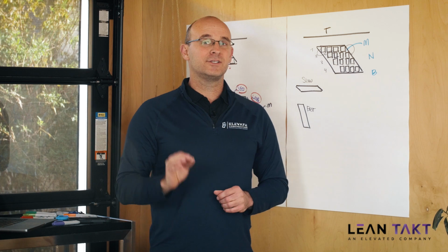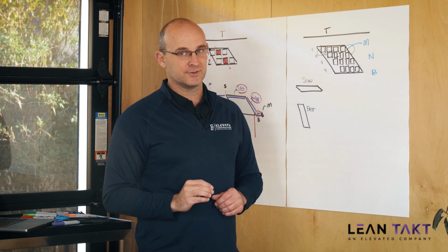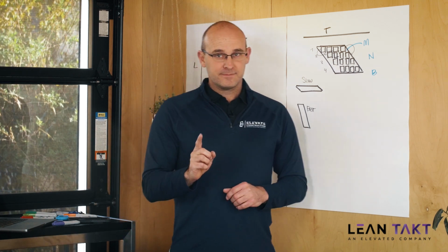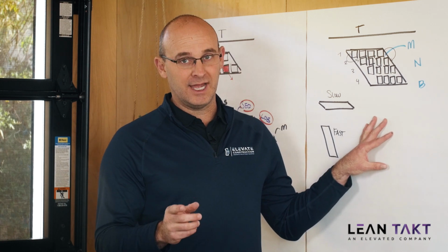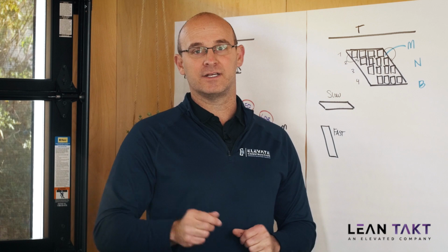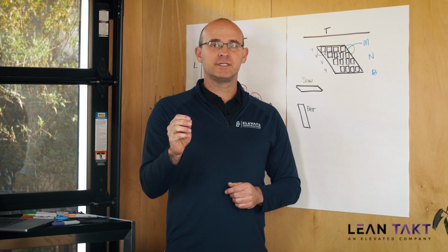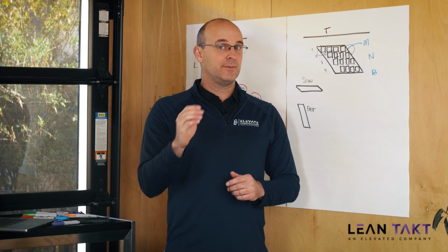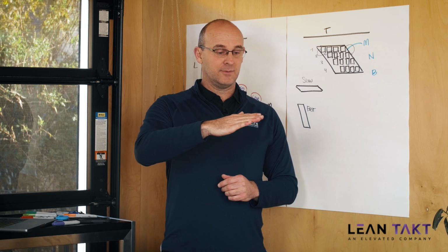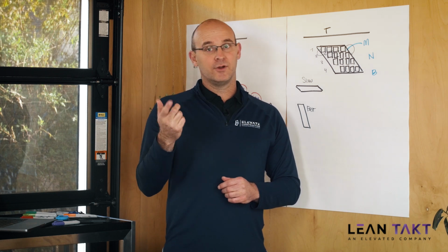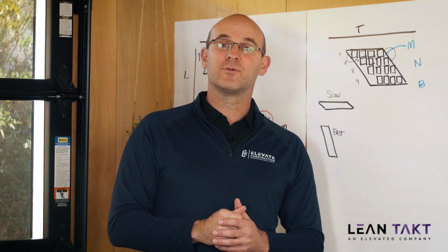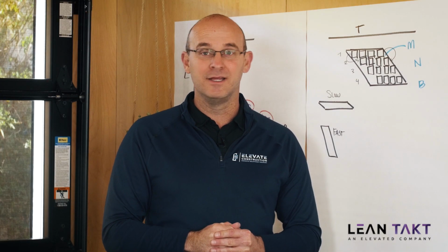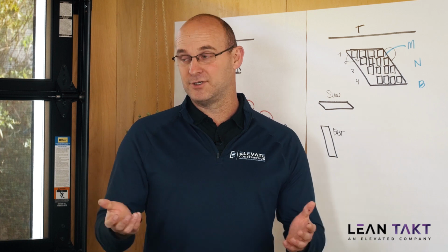So that calculation really gets us into a good spot, okay? Now, whatever realized flow potential you have in your phase is how fast you're going. If your realized flow potential is 35%, that means if you were in a car and your speedometer was 0 to 100, you're going 35 miles an hour. You could go 100, but you're going 35. If your realized flow potential was 60%, that means you're going 60 miles an hour, but you could go 100.